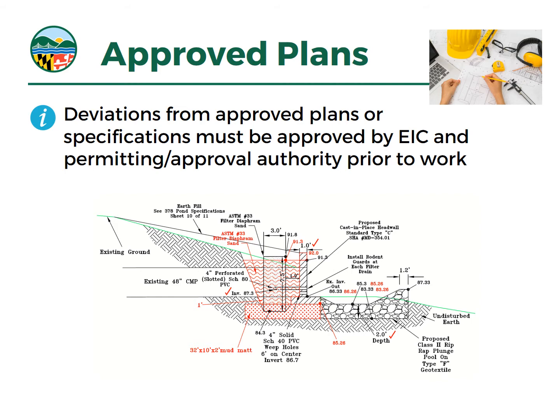The picture here in the slide presents a good case of a project recently that I was involved in in Calvert County, where during our pre-construction meeting, the contractor was there and had some questions about how to construct something on the plans. And we all got together, the engineer in charge, myself, who wrote the permit, and the contractor, and made some markups right then and there. We all agreed to them, and it made the project go a lot easier and smoother for all people involved. So keep track of those changes, keep track of the approved plan sets, and make sure we know what's going on. That's really important.